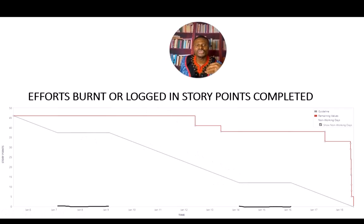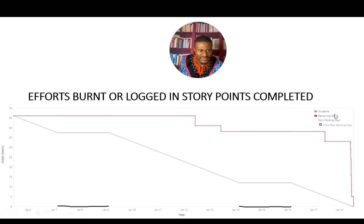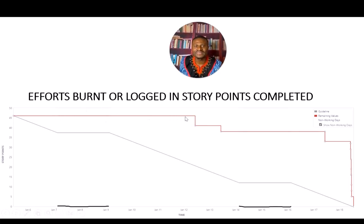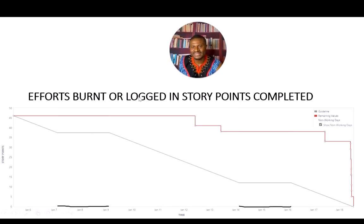The red line represents the remaining work. At any given point, the scrum master or team can look at this chart and tell what amount of work is left to be completed. The team started with 46 story points. Around January 7–9, there was a weekend, so no development work happened — you can see a flat line. Whenever you find a flat line, it means no work is being done, whether due to a weekend or an observed holiday.